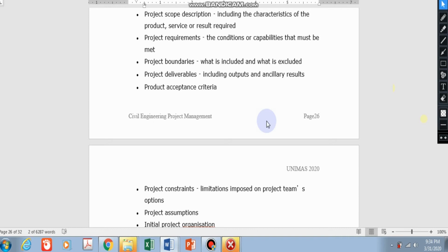If I finish the design, then later on I change one component, the rest of the components also have to follow suit and change. So it becomes a lot of work to do the changes. So you either do it now at the end of your preliminary design study, or at the beginning of your final design studies before you proceed with the final designs. That would be my suggestion.